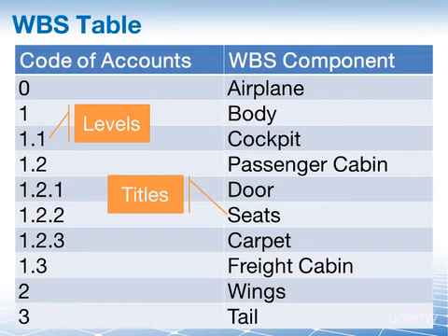But what about the details? Where do we define who the responsible person is for delivering the training? And what exactly do we mean by carpet and seats? What type of carpet, red or blue? And by when do we have to deliver this? And if your company has stringent accounting practices, you probably also need to have a charge account where all the costs that accumulate for this particular work package can be charged to.